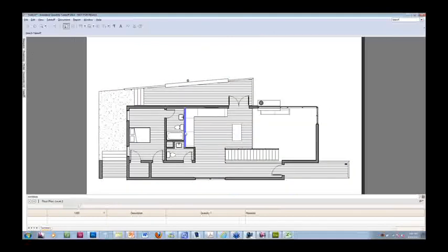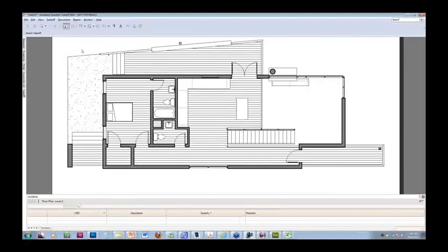So to do it that way, and even quicker without having to do it twice, there's an option here called One Click, and let me just show you. This is the one. It's called One Single Click Auto Takeoff. It's the fastest tool that you will ever use. What it does is you can select one object, and you can do the whole selection or one element by the same type, based on selection, so you can select the element.